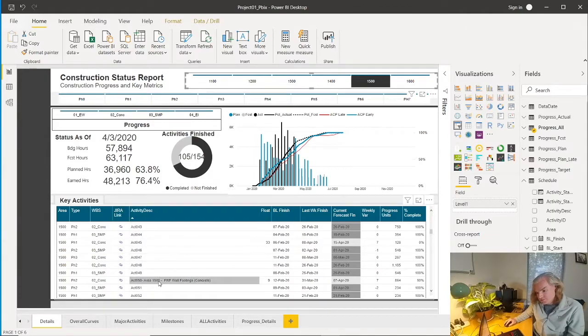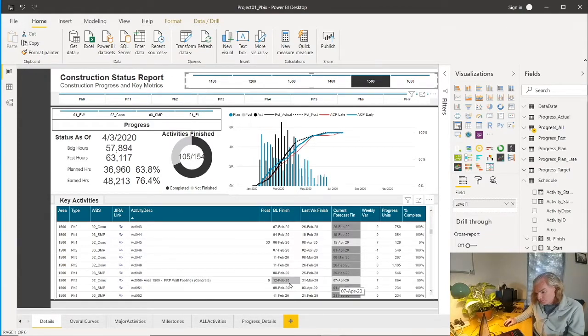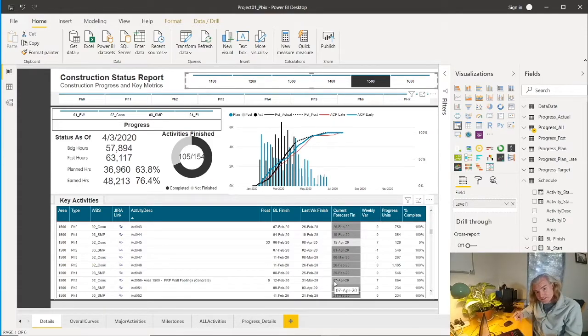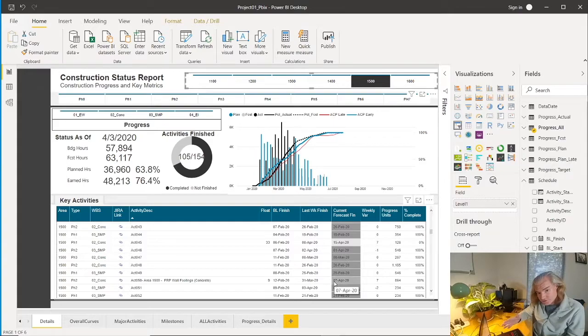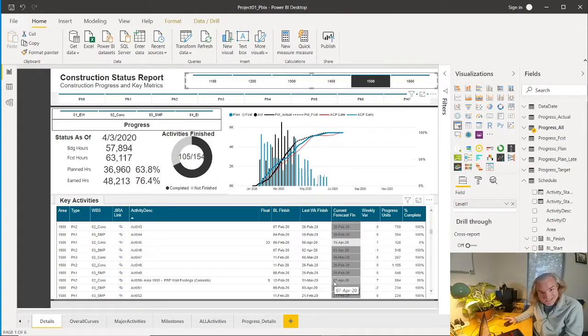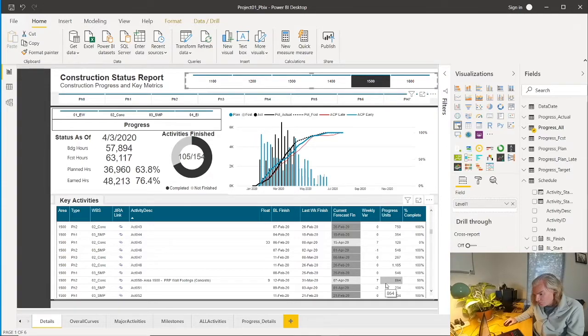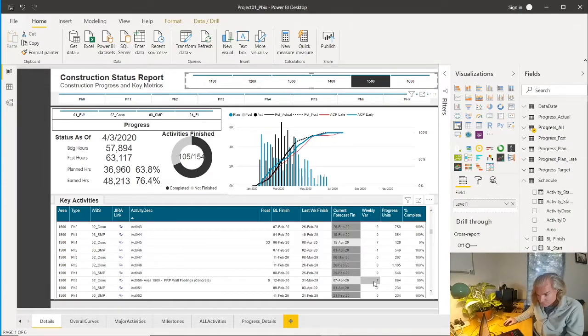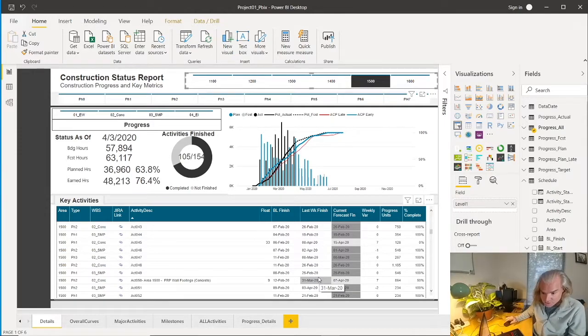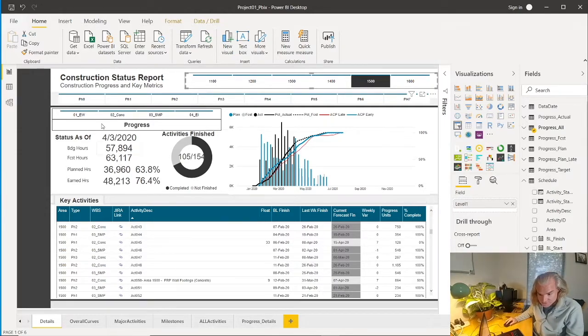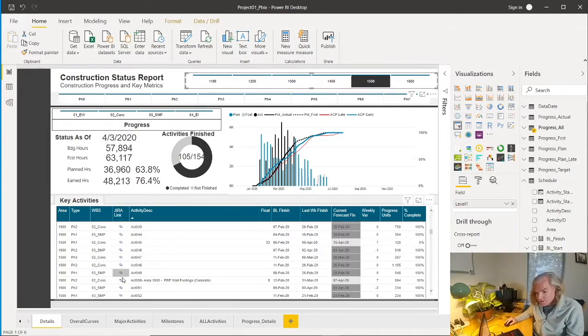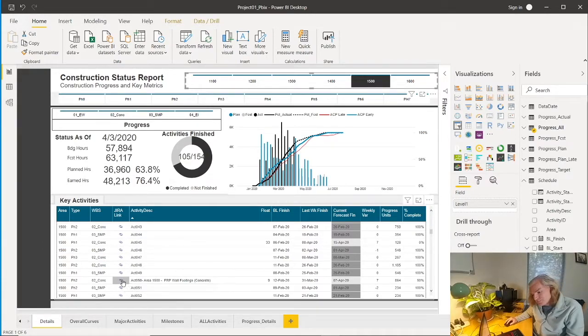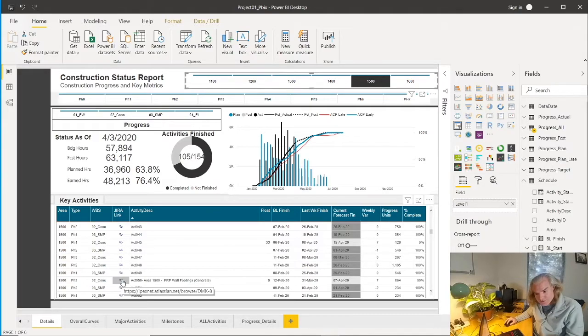For this activity, we've got a baseline finish of February 12th. We've got a current forecast finish from our data source, which would be a Primavera schedule, of April 7th. It's 50% complete, 864 hours, got some float or variance. This has slipped from at least the prior week when this dummy data was generated. Let's go into the link and see what happens, because this is where all the power is.